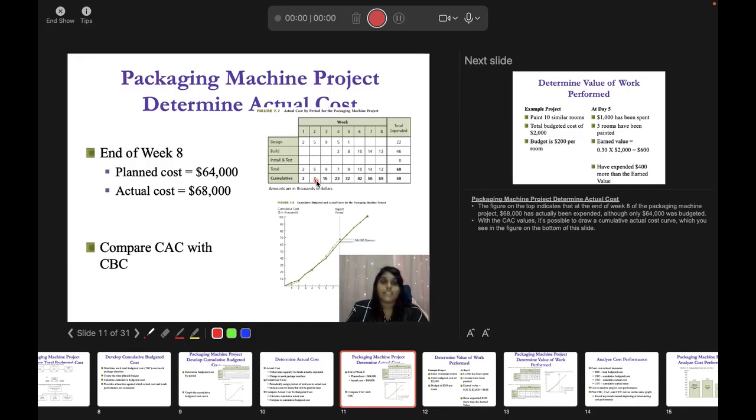So similarly, that is what happens in a project also. If there is a lot of cost being incurred, then it is very important that you notice the cost and compare the cost often, from week 1, week 2 itself. You don't wait for the last minute, not in week 8, not in week 12, to see the comparison. Then the actual cost might be way too high compared to whatever you planned, and the project sponsor is not going to give you more money, right?